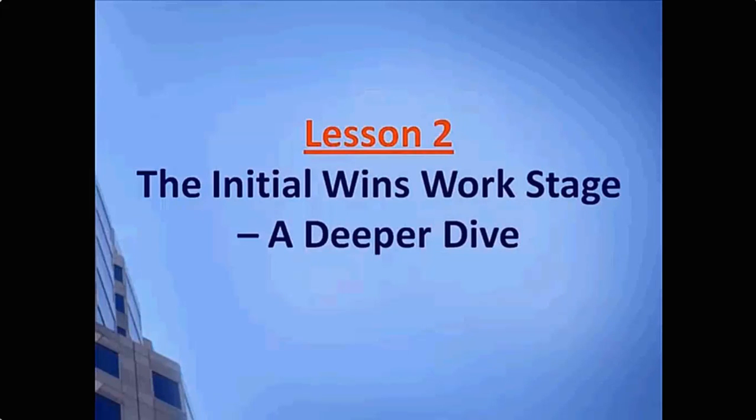So the Initial Win stage really takes an overall project approach for each initial win that you plan to be undertaking. This stage overlaps with the ITSM design work stage and the ITSM transition work stages. The reason being is that there is design work you will need to do that impacts your initial win project, and there's also transition work that you will be doing that also impacts your initial win project as that moves towards production.